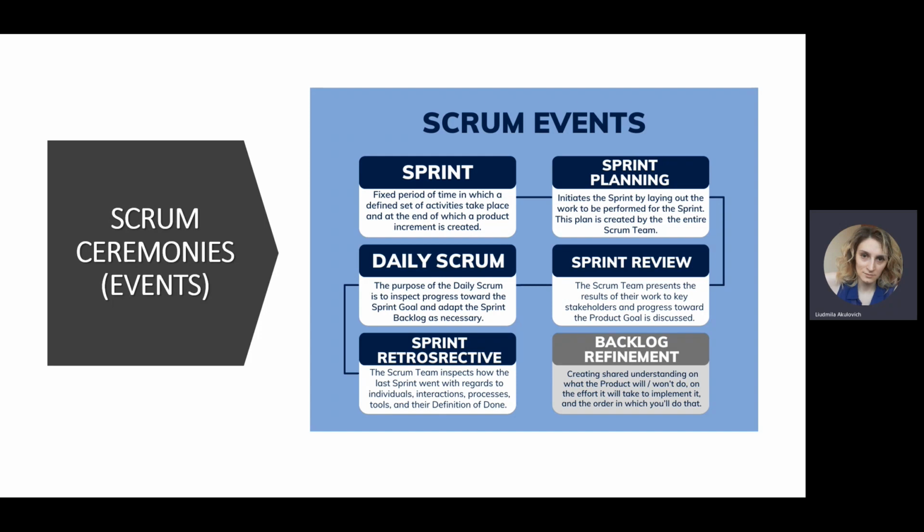The very last meeting of each sprint that closes the sprint is the sprint retrospective, or retro for short. During the retrospective, the team should analyze how the sprint went, and it's usually done with the help of a board with 3 columns. What went well, what did not go so well and can be improved, and the last column is action points. So the main idea is to analyze the process and try to make it better.